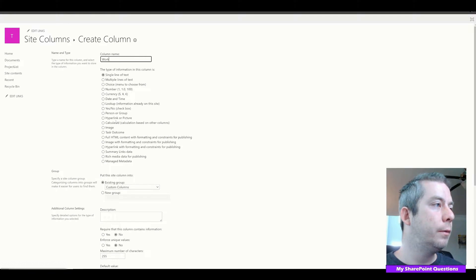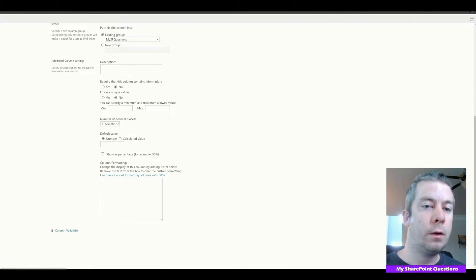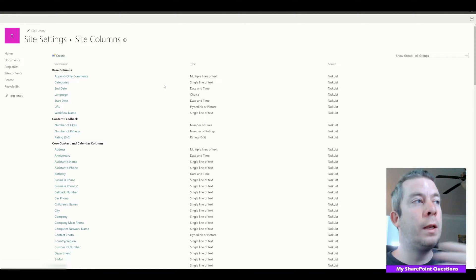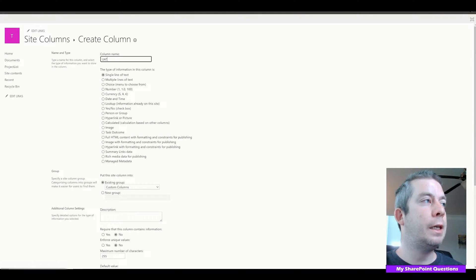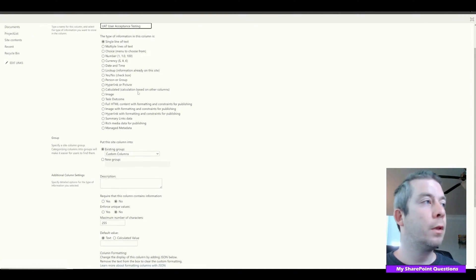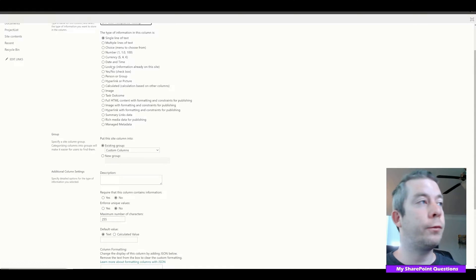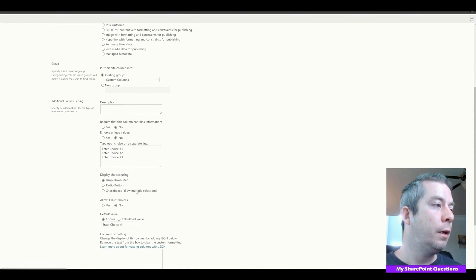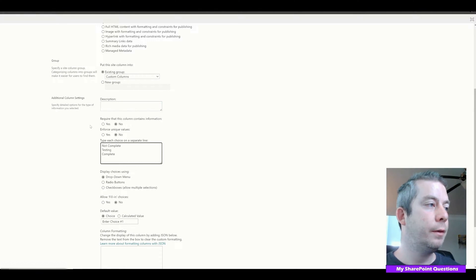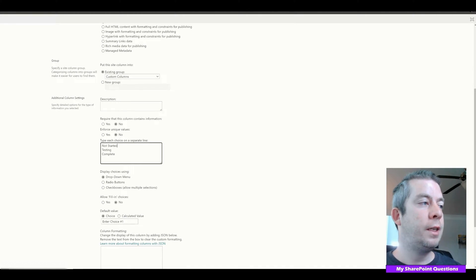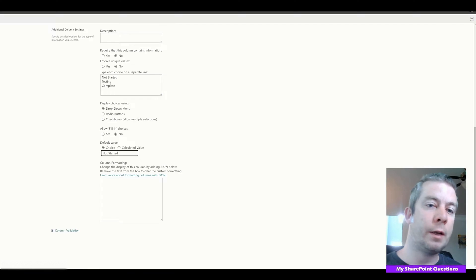Now I'm going to create one that's only in our software form: UAT, User Acceptance Testing. This is only in our software project. It's going to have choices: Not Started, Testing, Complete. The default value is Not Started. We'll make sure that column is also in our group.